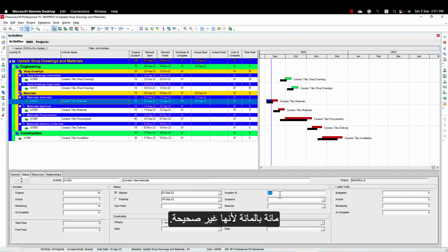But here, we will not put the percentage at 100% because it is not correct. As our colleague said, we might get review and resubmit. So normally, I'm putting 50% only, and I wait until I receive the reply from the consultant.